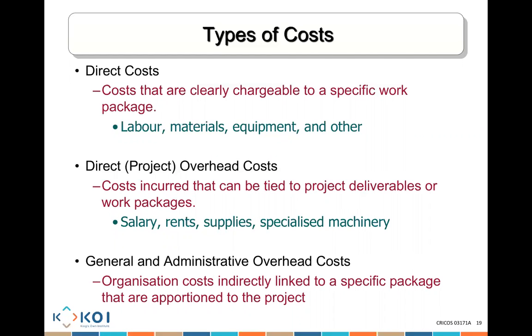It's really an overhead cost. The project manager might be managing the overall thing, but not actually working on the package himself, just overseeing the whole thing. There are also general and administrative overhead costs: organization costs indirectly linked to a specific package that are apportioned to the project.